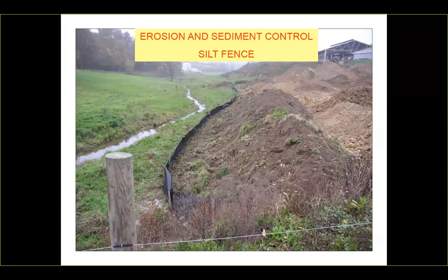Well, that's an indication right there that you're probably going to be in a world of hurt. Why? Because usually in a construction inspection sequence, there are benchmarks for where certain site visits and inspections need to take place. So no matter how motivated your contractors are, you want to make sure that for everything they're proposing, you can execute your responsibilities as the inspector, performing quality assurance on behalf of the landowner and the agency.